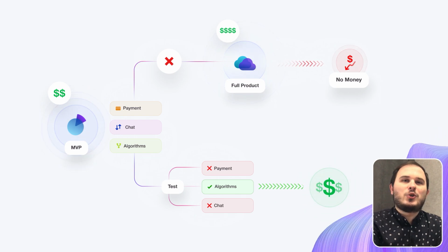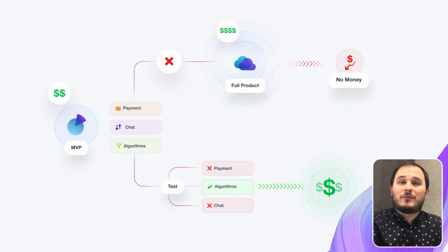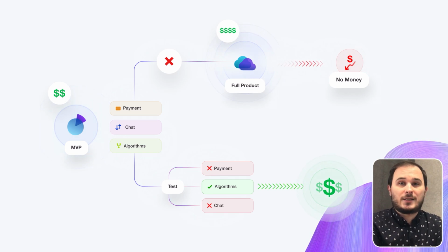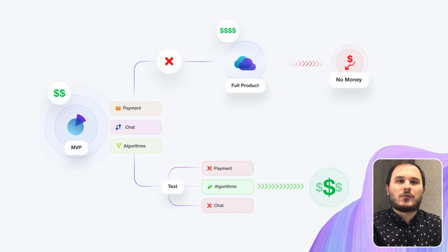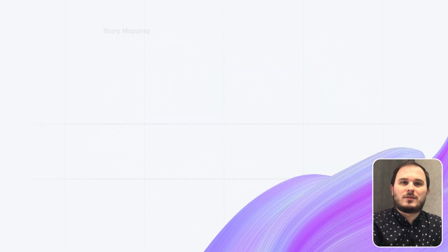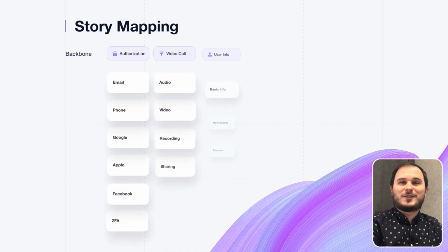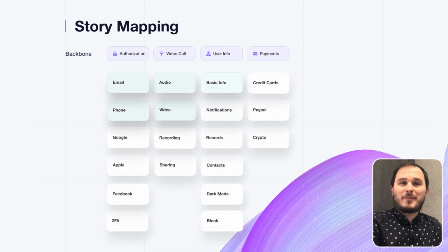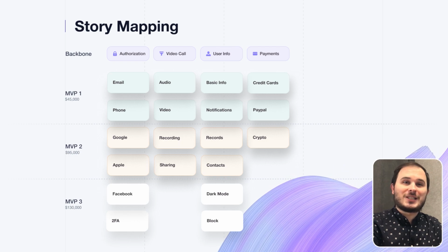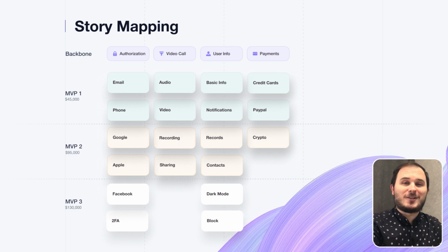Hidden gem. You would have to pivot a few times until you find a really perfect solution that will suit all your user needs. That's why limiting yourself with the amount of features for the MVP is so important. And that's where a story map comes into play. With a well-crafted story map, you can break down the user requirements and map out the essential features that need to be developed and launched quickly.